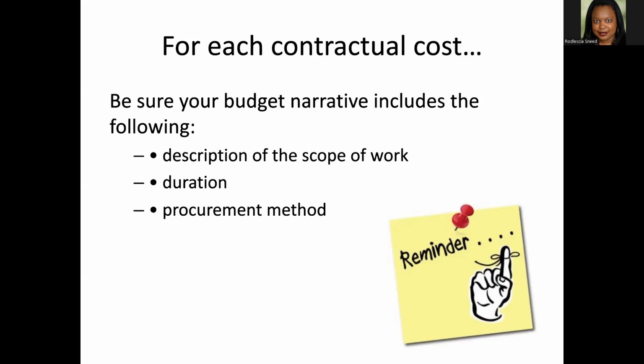So you might, for example, have a slightly higher cost, but that item came with a 5-year warranty, maybe where the lower cost did not. So some of those factors might change which item you pick.